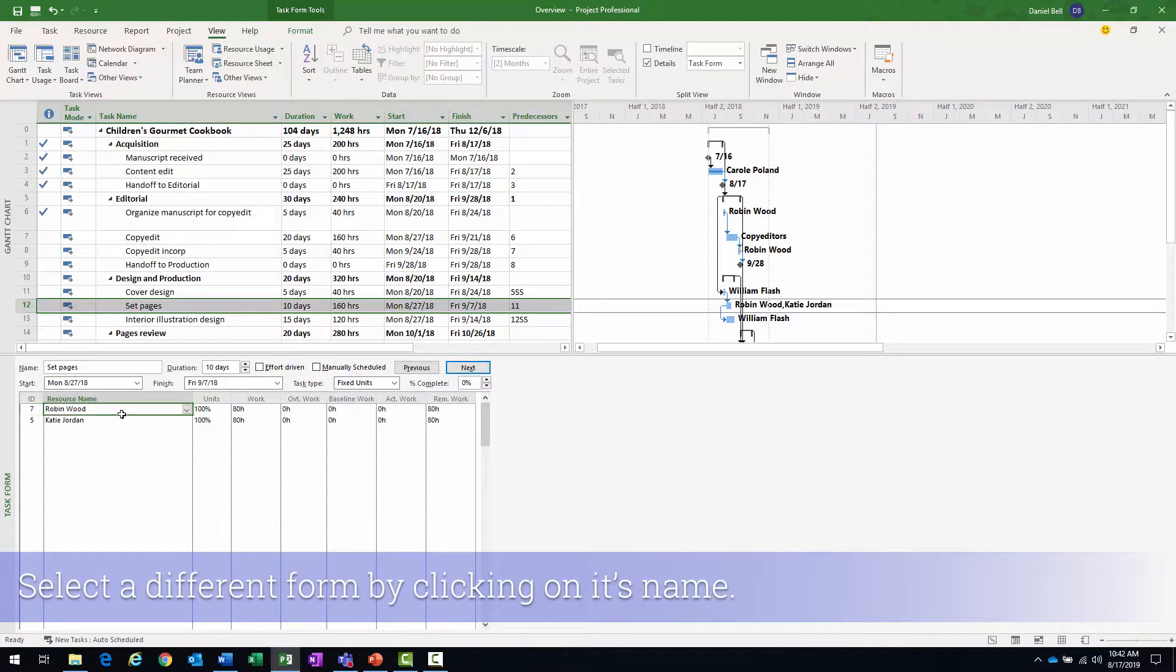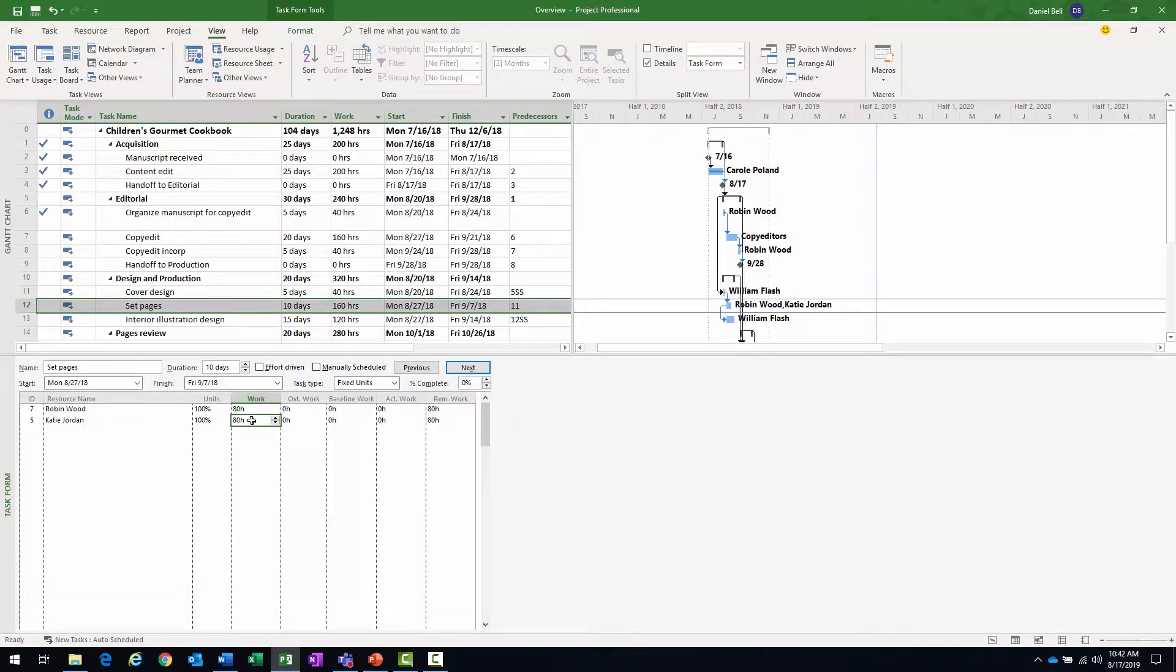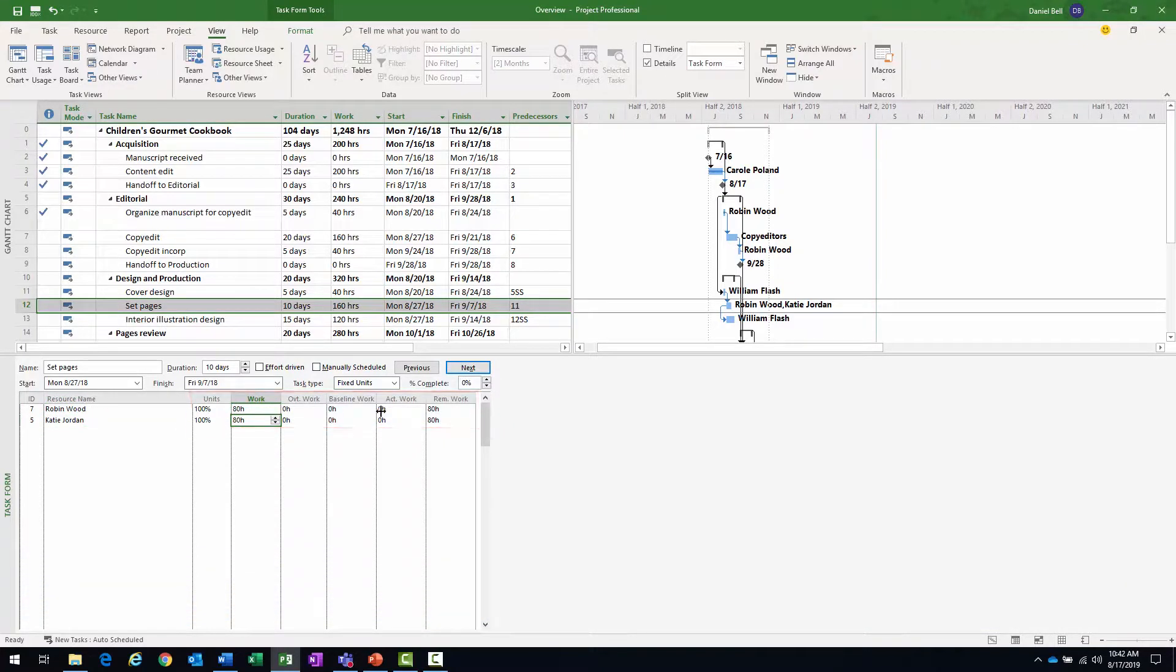same two resources, but now I can see the work per resource, 80 and 80. No work has been done, that's why there's no actual, and that's why the remaining and the planned equal.